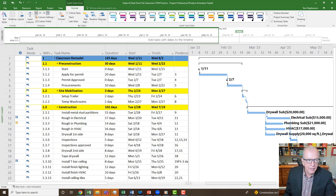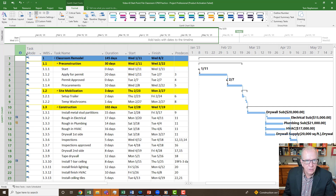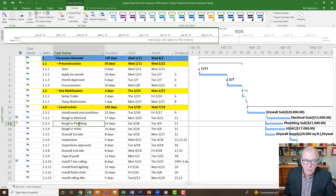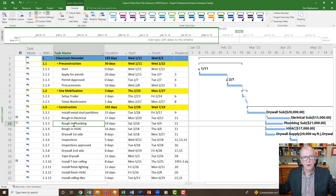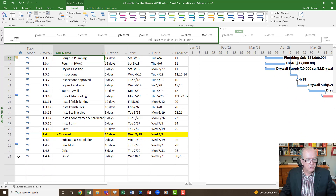The next place to look is the indicator column. This column is really your friend because it tells you if you've done specific things to activities — it gives you a heads up and it's a good first place to look. It'll show things like whether a task is a recurring task. You could have a recurring task — like site meetings — that's longer than your overall project and not connected to anything, taking over the critical path.